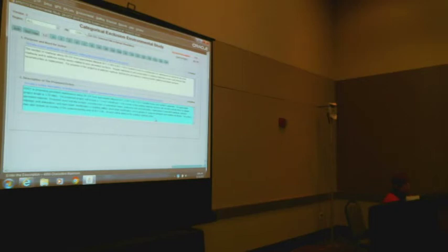It's also specific to the project. So just because you had one project there, if you have another project come through that area later, you need a whole new environmental document. It's a different project. It's very specific. NEPA is very specific to a finite action in time. It's not a blanket clearance for all of eternity. If you need to do that on a project, you can do things a little bit programmatically. You can do some planning documents, but it's not a blanket clearance, and you would still have to probably do some reevaluations in case conditions change.